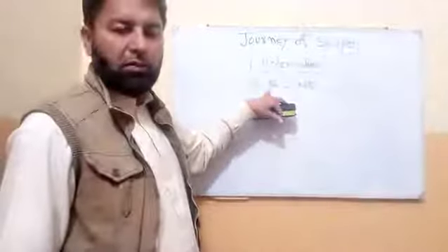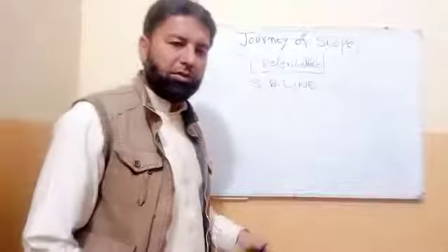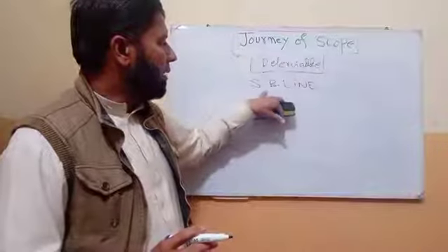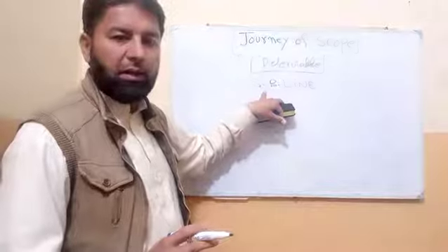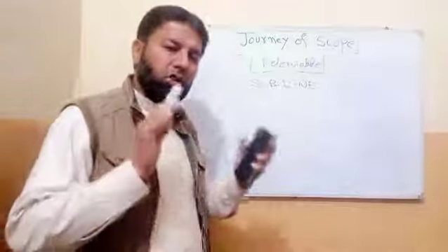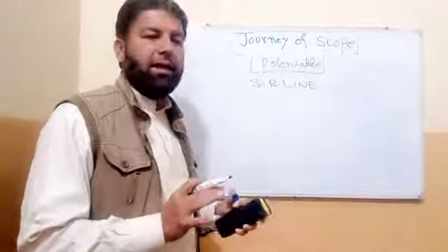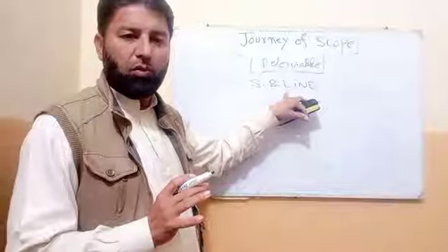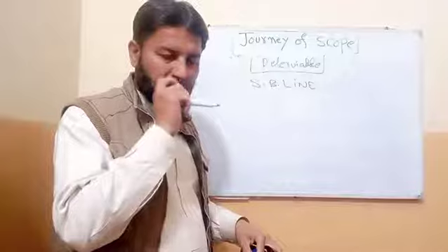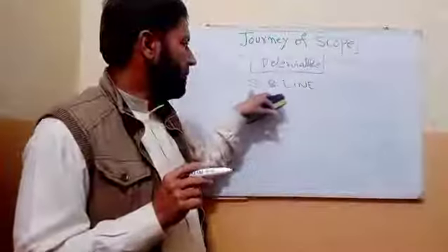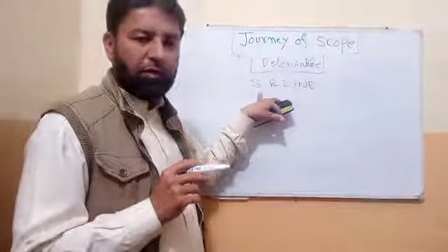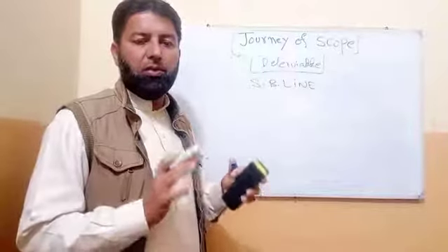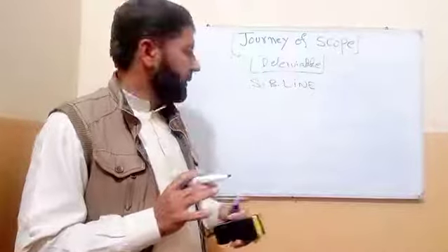The scope baseline will be submitted to the sponsor or client. When we get approval of the scope baseline, after that we should not add anything or remove anything from it. This is a very important document. When we get approval from the sponsor, after that we should not remove or add anything.